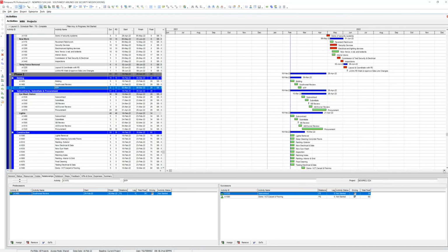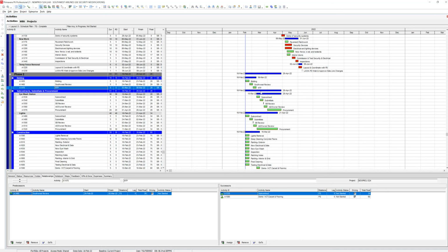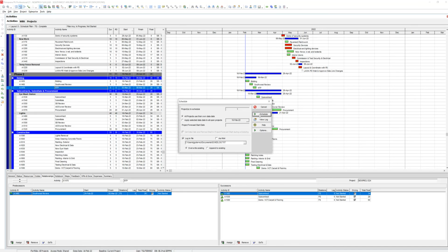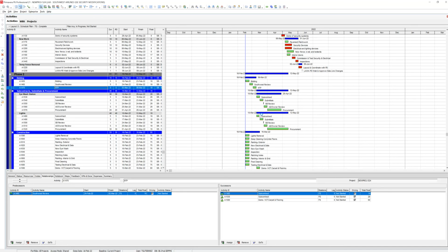We cannot start subcontracting that guy until we get our NTP, right? It's just the same thing with the light guy. We can't start subcontracting until we get NTP. So now this is making more sense, right? So you almost got to try to look at the schedule linearly, right? So now, perfect, we're subcontracting.